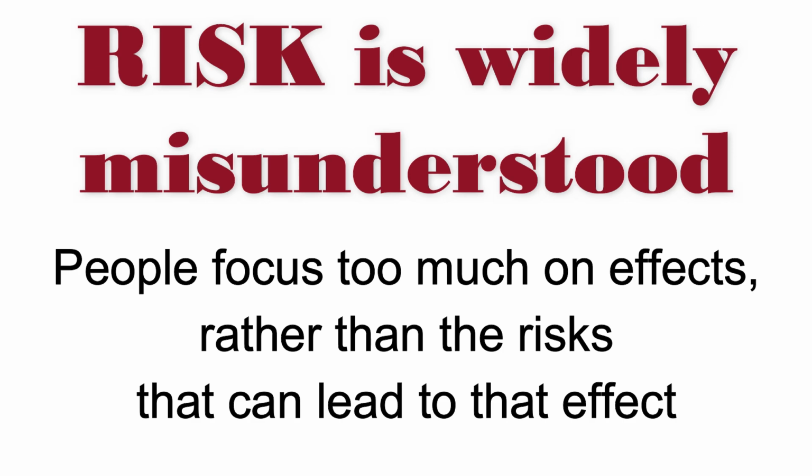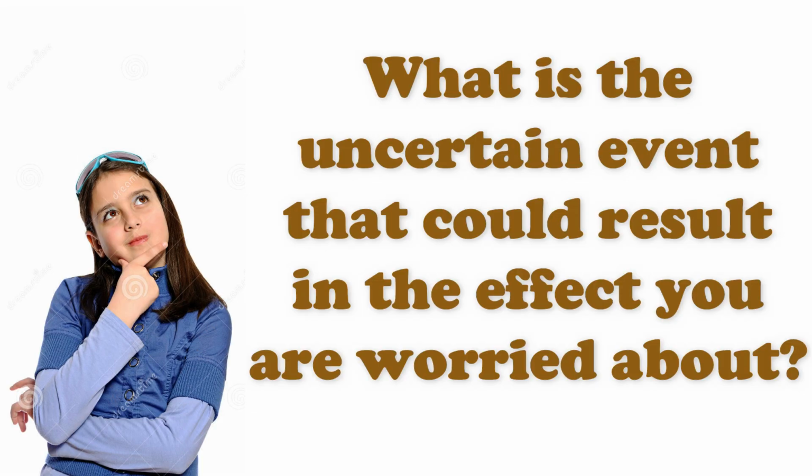So the risk of delay is really a risk that would have the effect of being delayed. But what is the risk that would cause the delay effect, right? A risk of going over budget. What is going to cause your project to go over budget? The effect is going over the budget. But what is the risk? What is it that could happen that is uncertain, that you don't know for sure is going to happen, that if it happens, it's going to have some sort of a negative outcome on your project or your plans? So that is the risk, the uncertainty, the unknown part, right?